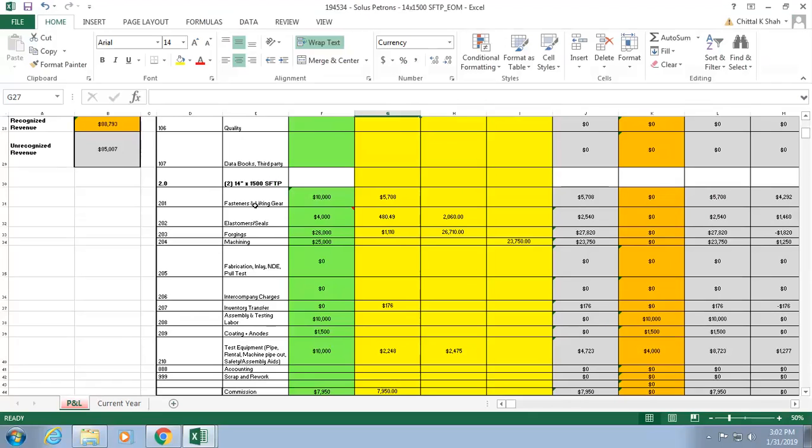The definition of WBS is related to the manageable chunk you want to monitor. Like PK mentioned, if you want to track inventory transfer, or track what we are spending with STNR, or whatever it is, you break that chunk into that bucket, and numbers are free. Enrique can create whatever numbers you want, and we'll assign the budget. Yeah, we shouldn't forget to distribute those numbers. Make sure we create them, then we have to use them. Good point, thank you.